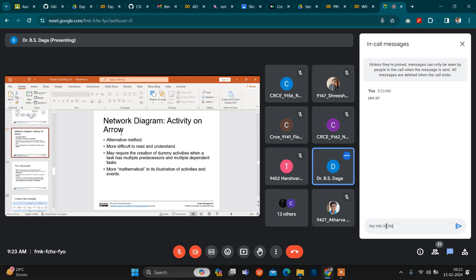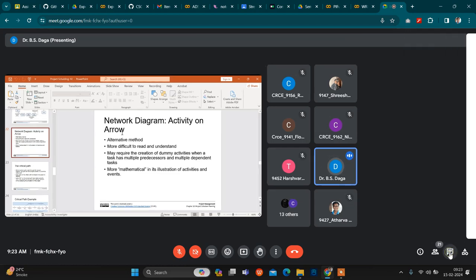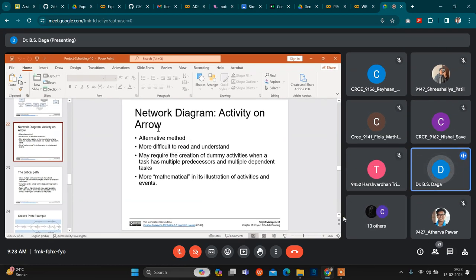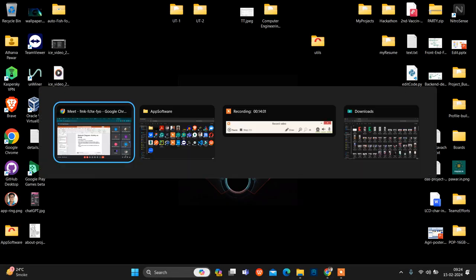The length of the arrow normally denotes the duration of the activity, and each arrow connects between two nodes. Sometimes through an arrow we can indicate a dummy activity. A dummy activity does not consume any time. When two parallel activities are simultaneously completing, the dummy activity brings these two different flows into one point. That is the necessity of the dummy activity — it is created just for convenience, to maintain the flow in the network.